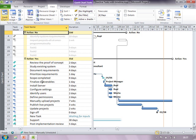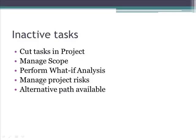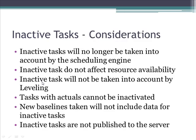So this is how you can make use of inactive tasks in Project 2010. Let me just go through a few considerations which are important before you work with inactive tasks. Firstly, as we have seen, inactive tasks will no longer be taken into account by the scheduling engine. Secondly, inactive tasks have some resource assigned; it will not affect the resource availability at all.